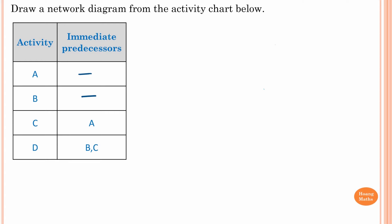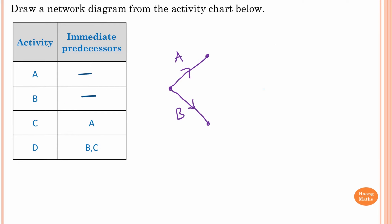We know that A and B have no immediate predecessors, so we can draw the network. This is activity A and this is activity B. For activity C, the immediate predecessor is A. Take note that B and C have the same vertex because B and C are immediate predecessors of D.